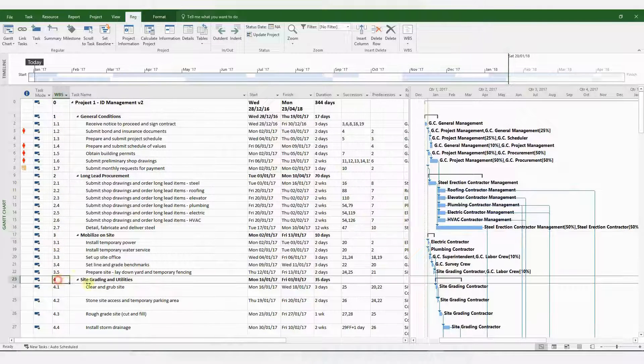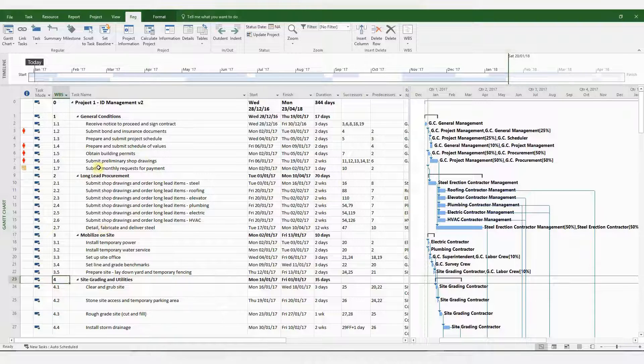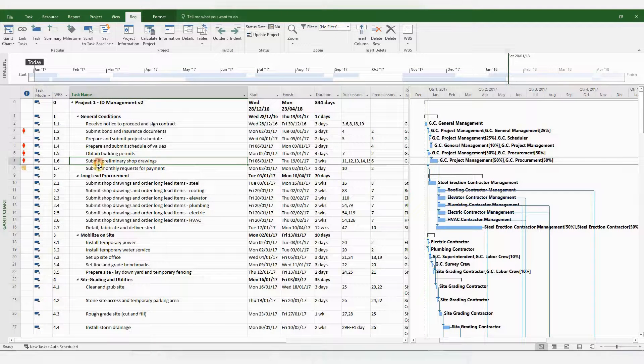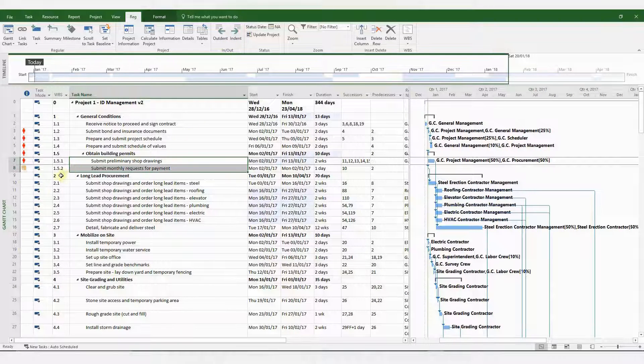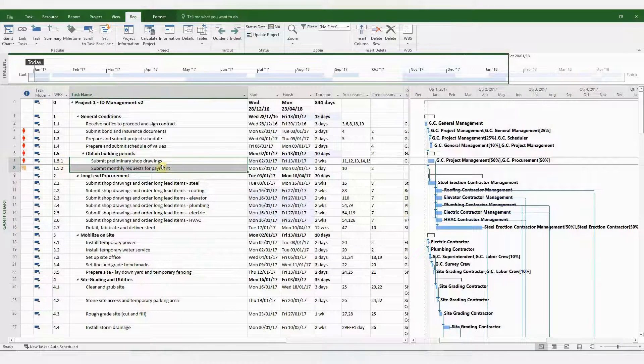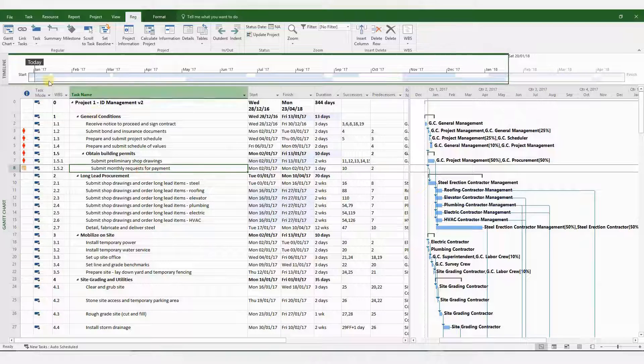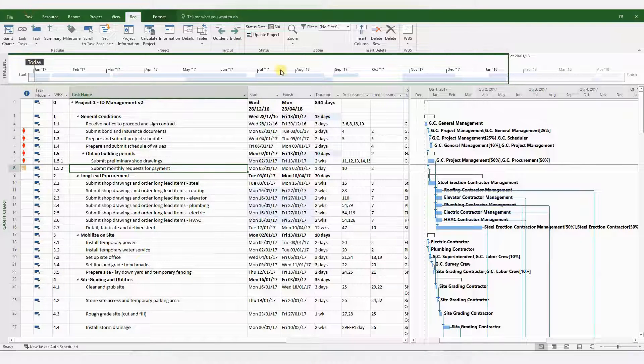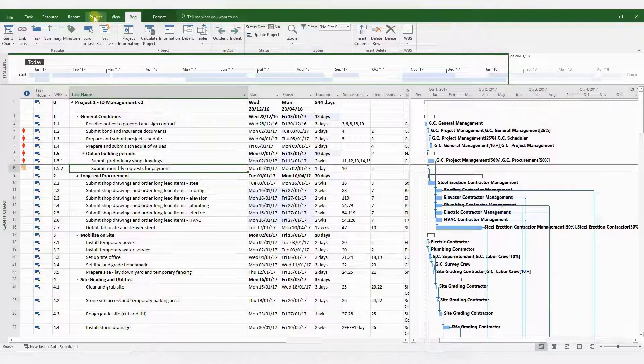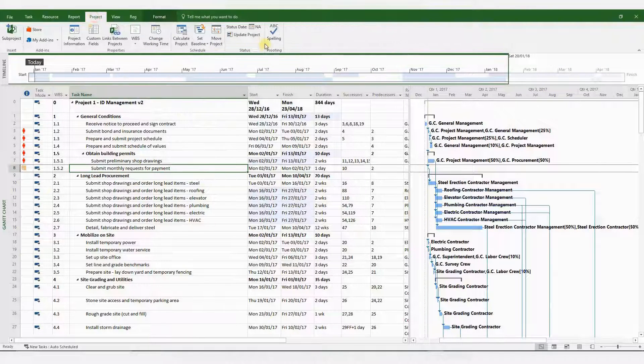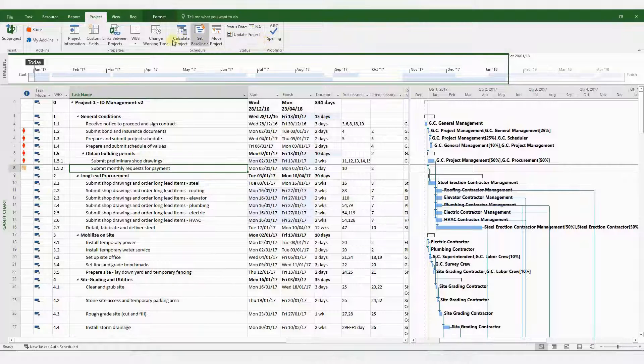For instance, if I indent a few activities, it inserts sub WBS codes. 1.5 has been converted to 1.5.1 and 1.5.2 for subtasks.